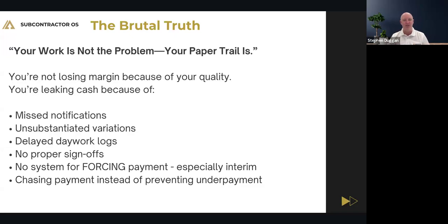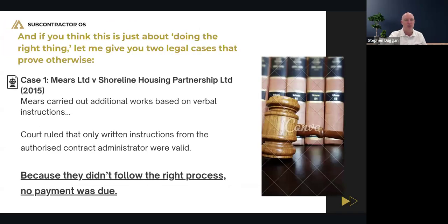They let him work on that basis for about 12 weeks. He gets to the end of the 3 months and puts in his claim. Now he'd been claiming and they'd been paying him a figure on account. And at the end of the 3 months, the project quantity surveyor gets out and remeasures the whole thing at bill rates. And the guy was out 100, 200,000. I can't remember the actual number. And everything that had been agreed with the foreman, with the project manager went out the window because they didn't have the authority to issue an instruction under the subcontract. And the commercial manager just threw it out, just like my claim in Germany.